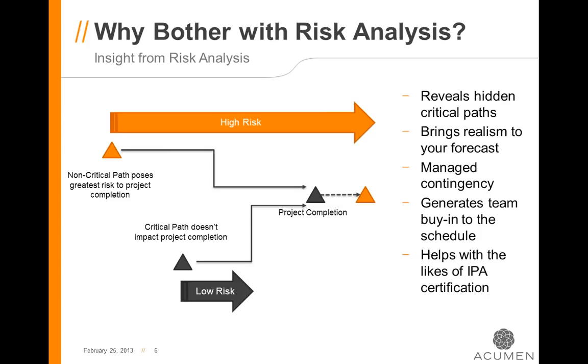However, we might have a non-critical path, one that doesn't even approach criticality, which has high risk on it that we haven't discussed and that we haven't built into the project plan. I'm willing to wager, I haven't pulled the statistics on this, but for at least the projects that I've worked on, I can say the critical path at the beginning of the project was not the critical path at the end of the project. Something happened along the way.